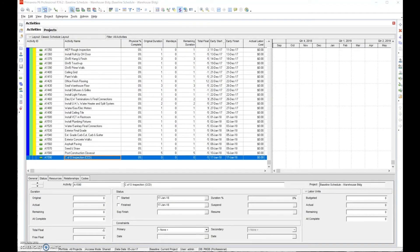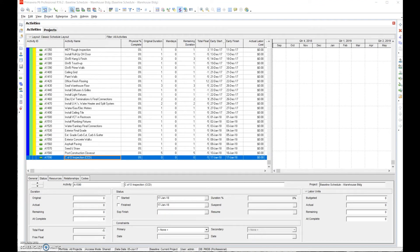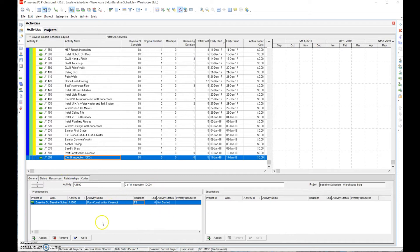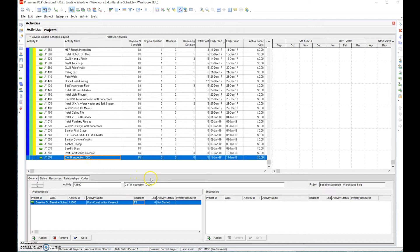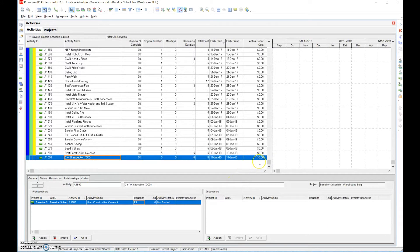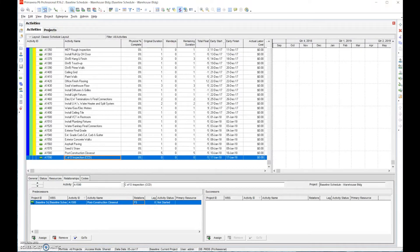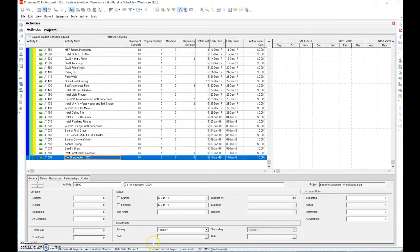Step number eight is successor. In the last presentation, step seven on predecessors, we left off where we had an activity that had no predecessor or successor. So we went ahead and assigned a predecessor of post-construction closeout to the last activity, which is Certificate of Occupancy Inspection, CCD contract completion date. By doing that, now we have a closed network and we're able to look at float numbers and correct them as necessary.